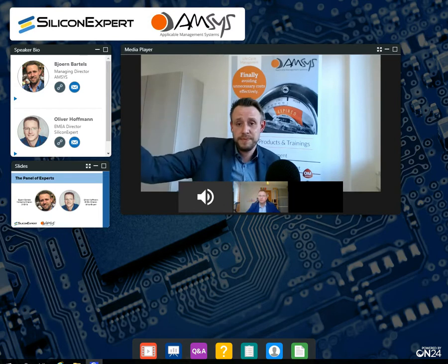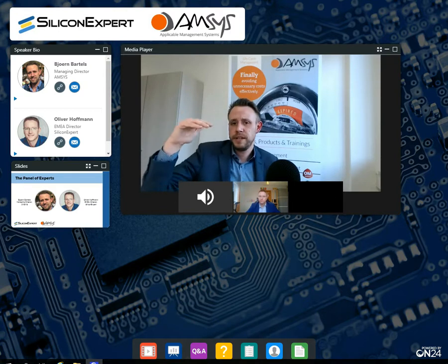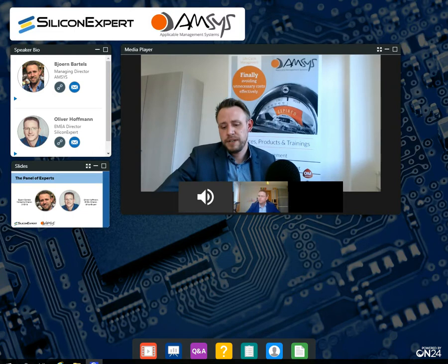and even NR&D components at a certain point in time in future. That might mean to you that when a component jumps from being completely active to NR&D, you might want to stock up a little on this specific component. But to answer the question, to trigger the design, go away from this piece part view and really look at your overall configuration with all the data you need on each and every item that is built into different systems and so on. Combine all this data and transform data to information and then to good decisions in the end.